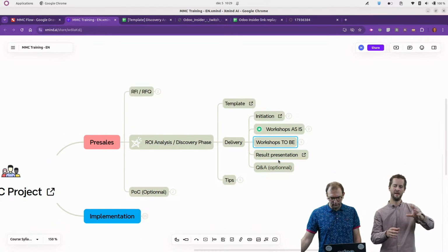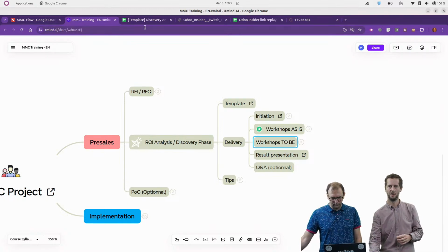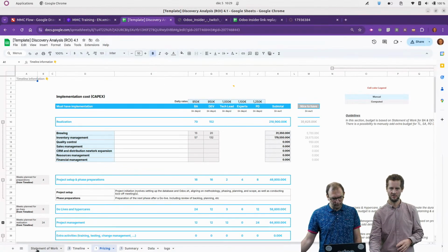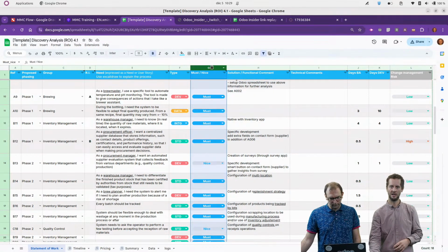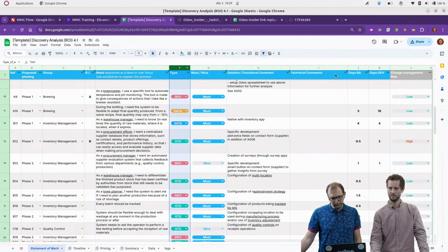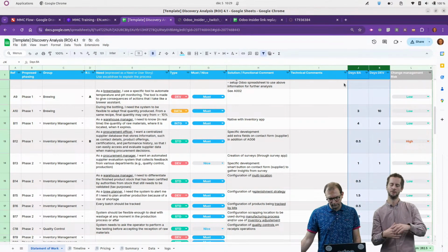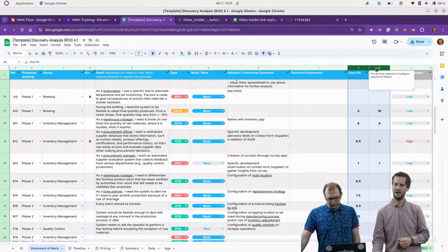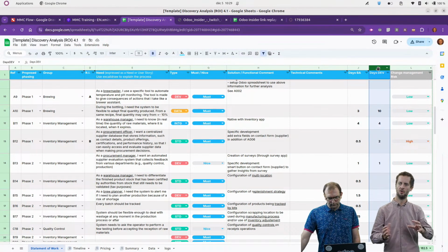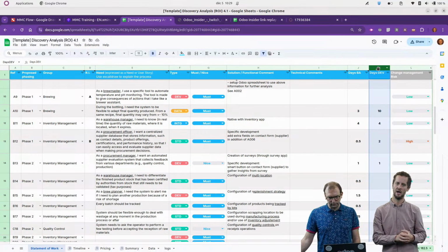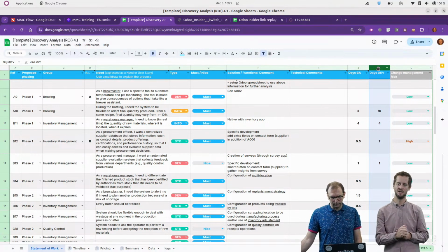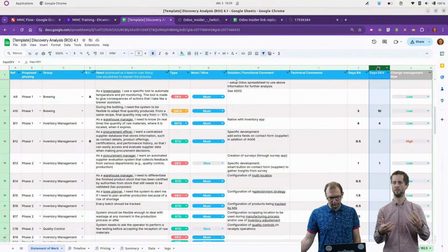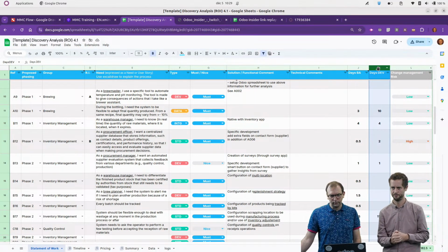After that, we're going to analyze all the items and provide a solution, as I showed in this file, in the statement of work. We classify the needs, we type them, and we estimate the time required to handle them, either with BA work if it's standard, or for specification, etc., and some days for the development items. This is done during the analysis phase that we do internally without involving the client, except if we have some questions or need some extra information.